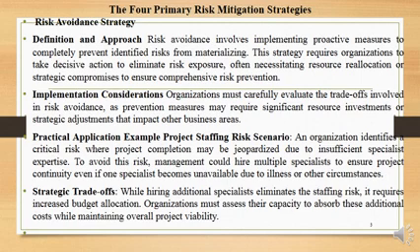Practical application example: project staff risk scenario. An organization identifies a critical risk where project completion may be jeopardized due to insufficient specialist expertise. To avoid this risk, management could hire multiple specialists to ensure project continuity, even if one specialist becomes unavailable due to illness or other circumstances beyond their control.